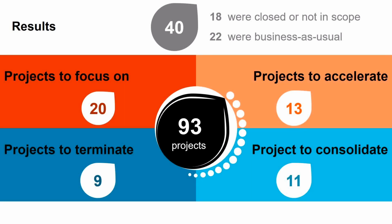Thanks. Yeah, so executional deficits. We were very surprised to see, for example, the incentives. I don't know if it's the same in your companies, but we're incentivized on annual objectives that are most of the time functional or siloed into where you're nested in the organization. And this was a big thing for us on what an executional deficit would be, because if in the team you have someone from IT, from HR, from the business that are not incentivized the same way on this project, it will most likely not deliver.